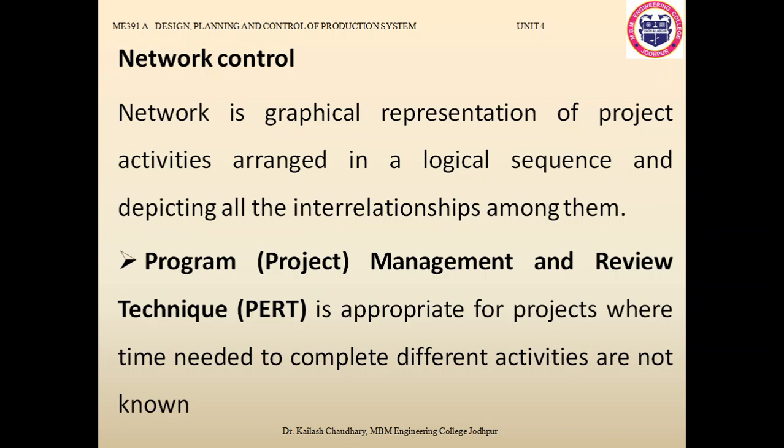So we will try to understand the difference between PERT and CPM, and how we can use them to successfully manage any project. Program Evaluation and Review Technique, also known as PERT, is appropriate for projects where the time needed to complete different activities is not known. So this is the condition for PERT.